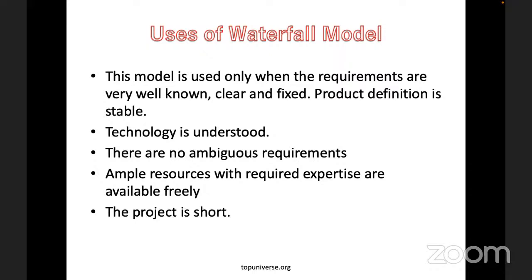Also when the technology behind the whole solution is understood, when there are no ambiguous requirements, and when ample resources with the required expertise are available freely. One of the most important uses of the waterfall model is when the project is very short and won't take so much of our time.